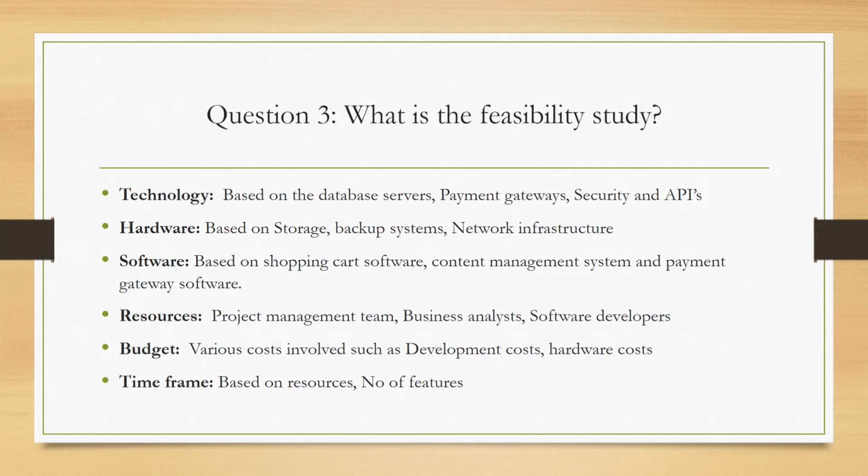For example, we have only three developers, but the project is around 2 years and the budget is 2 crores. In this scenario, can three developers complete the project within the time? No, so we need at least 5 or 6 developers. Then only can we complete that project in the correct time and budget.